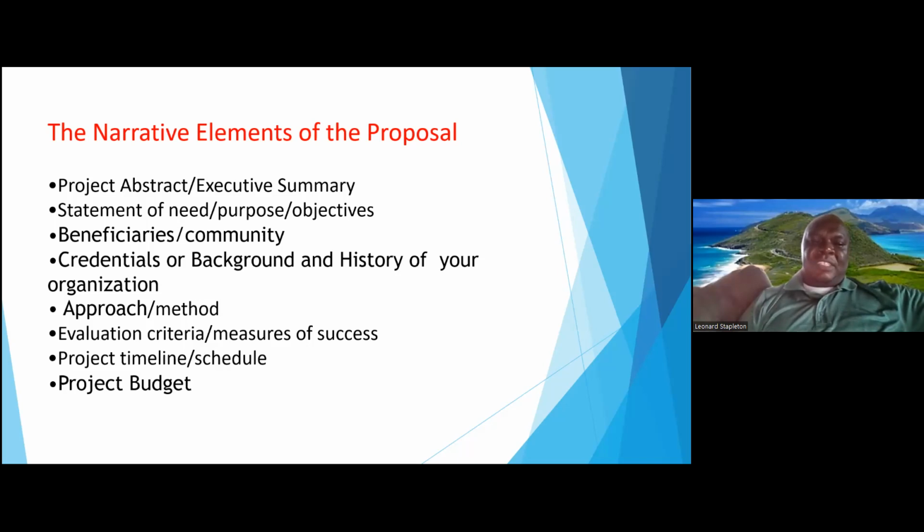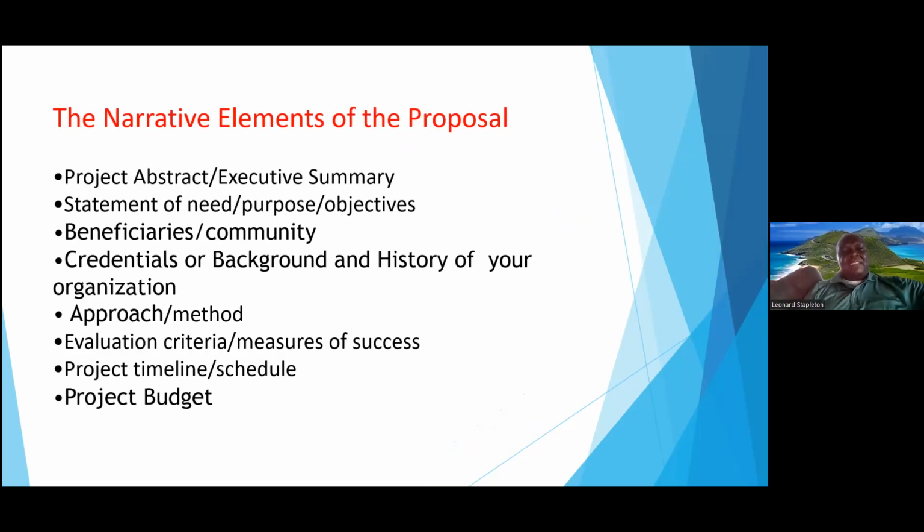So you need to get assurances so that when you do now get the funding, because there will be a delay between when you write the proposal and submit it and when it gets approved, and also a delay between when you get approved and when you get the funding. During that time, the price of items that you have in your budget could change.